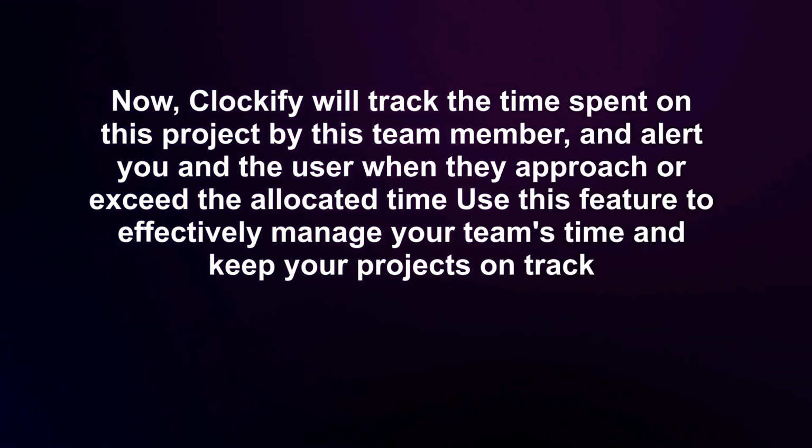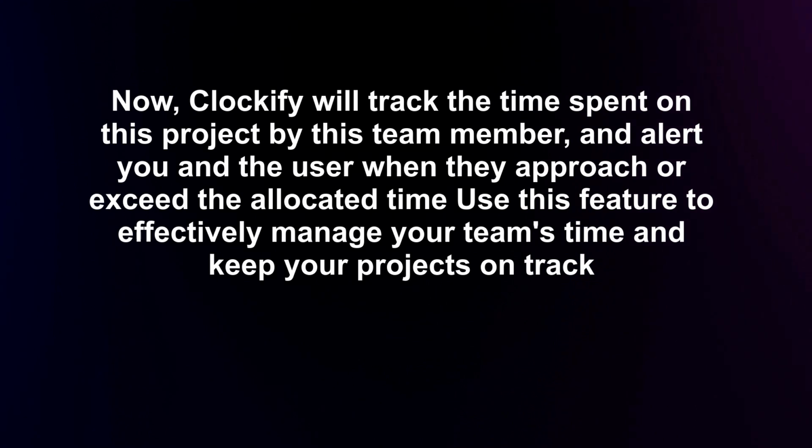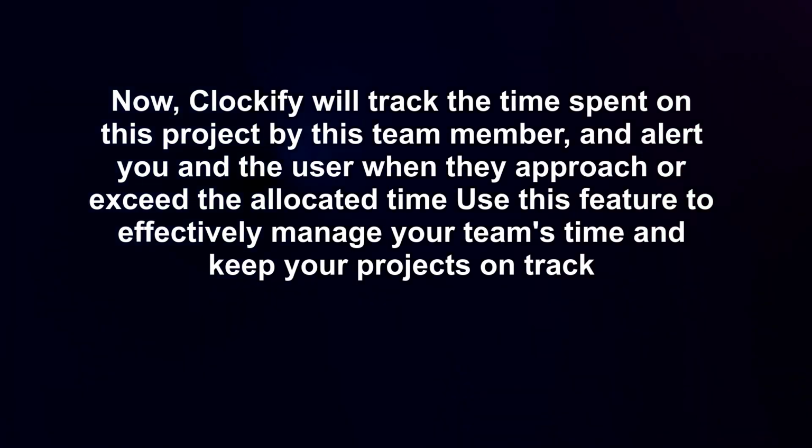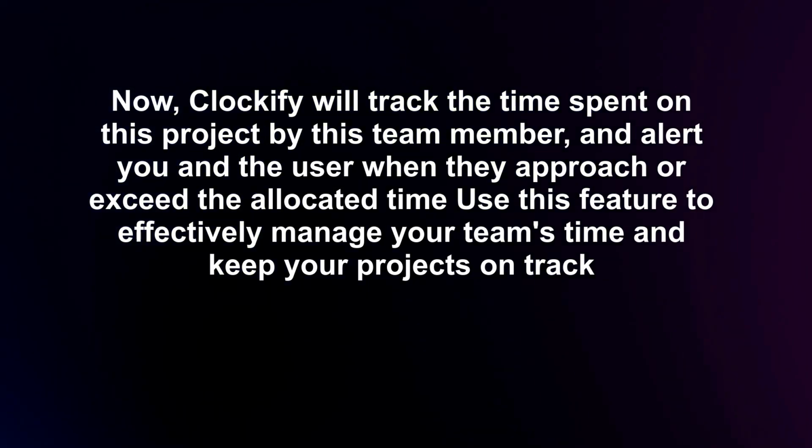Now, Clockify will track the time spent on this project by this team member and alert you and the user when they approach or exceed the allocated time. Use this feature to effectively manage your team's time and keep your projects on track.